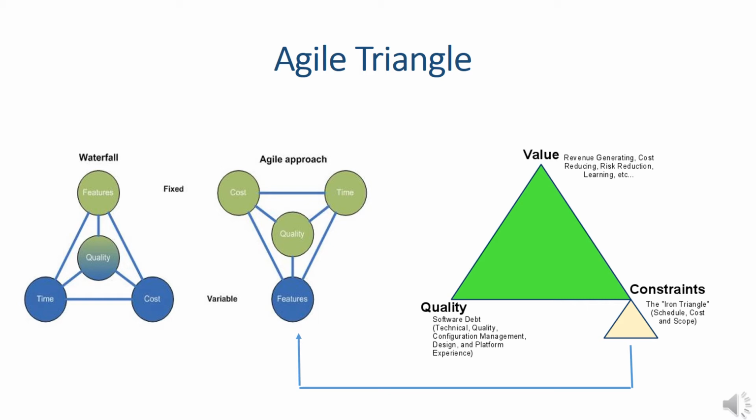The reason is that Agile is aiming to release the product sooner in the market with a baseline of critical features, which we call the minimum marketable feature. Now, suppose in one sprint, which is of 4 weeks, you are going to release, say, 5 features of a 20-feature set.